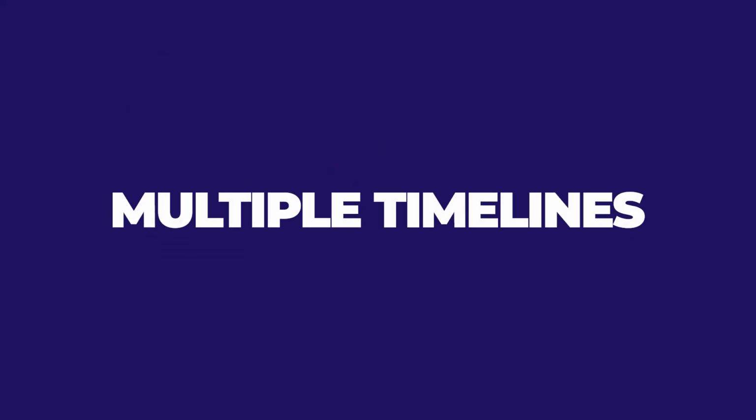start so you can maintain a flow, but there will be multiple timelines that have to be managed along the way to make sure that that production plan can actually happen. Things like switchgear, permanent power, internet to the site, long lead material procurement, exteriors, elevators. These are timelines. And I want to remind you of a really neat saying that I heard one time. I actually learned it from Fred Strasser at Oakland Construction. He said, "Don't fall asleep on that timeline."